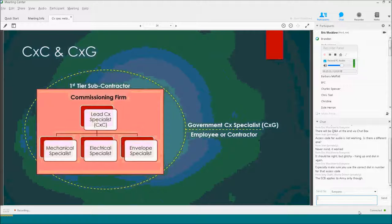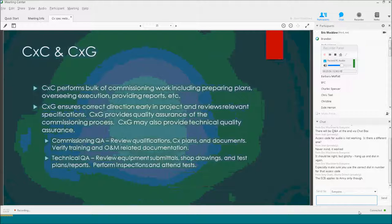Envelope commissioning is an option in this spec. Some people feel the Division 07 specs that talk about air tightness and air barriers are sufficient; others don't — that's why it's an option. For your project, you can decide whether to roll it under the single commissioning umbrella or if those 07 specs meet the needs. The government specialist is an employee or one of our contractors. We can hire them through an AEIDIQ or whatever means we have, or it could be an employee.